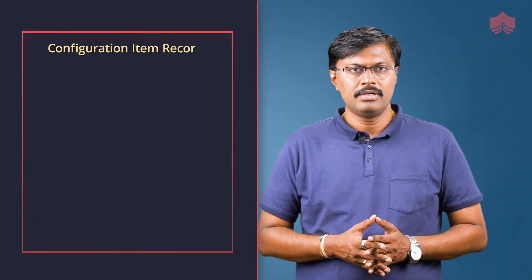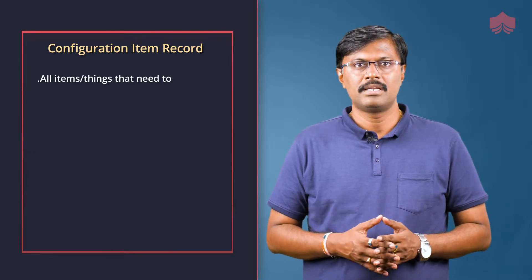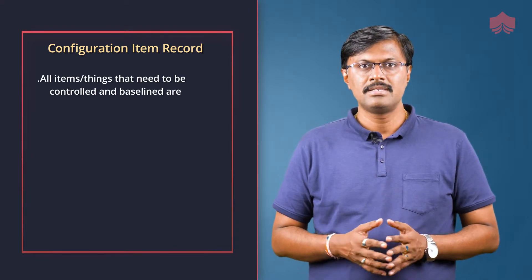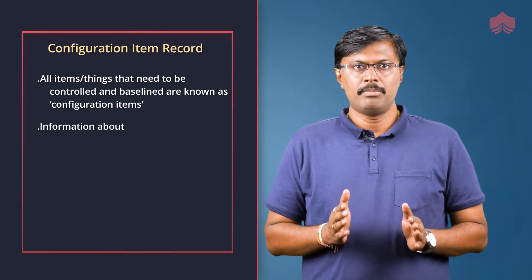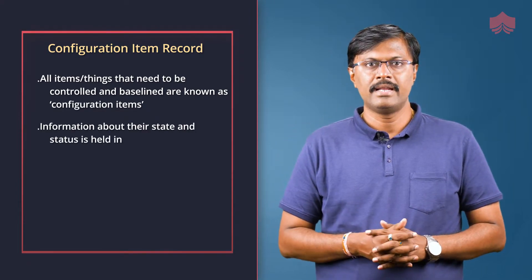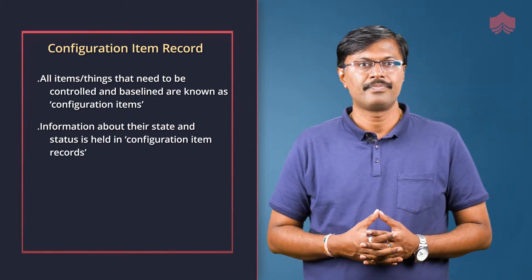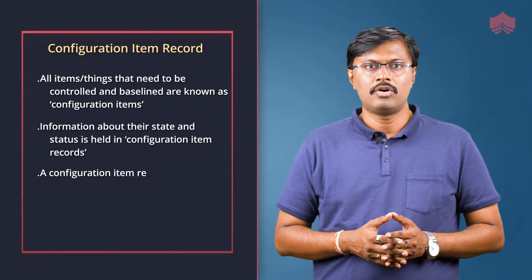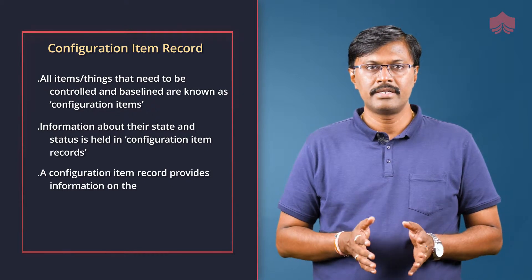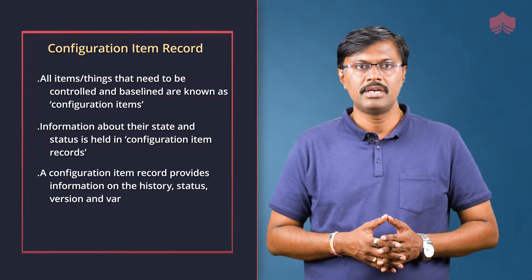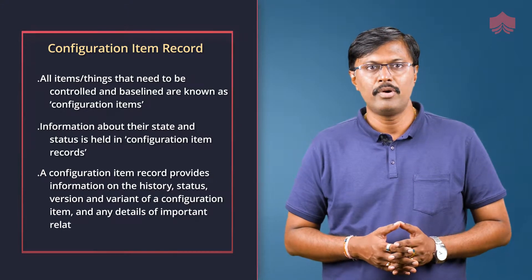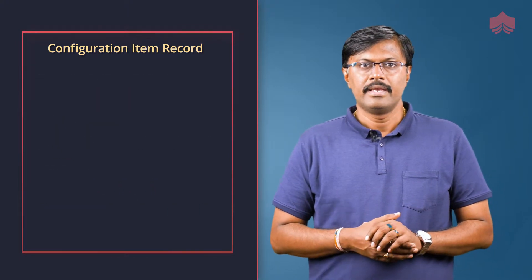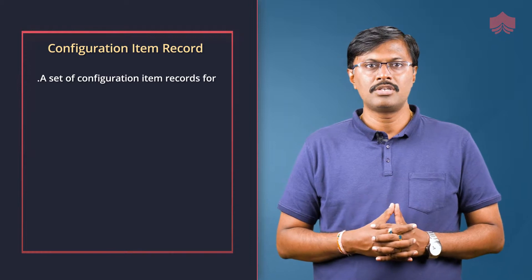Configuration item record captures all items — things that need to be controlled and baselined — and are known as configuration items. Information about their state and status is held in configuration item records. A configuration item record provides information on the history, status, version and variant of a configuration item, and any details of important relationships between them. A set of configuration item records for a project is referred to as a configuration library.